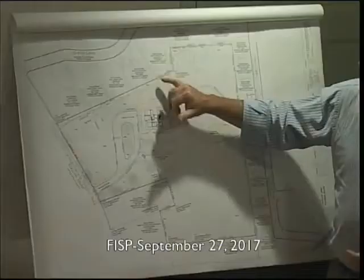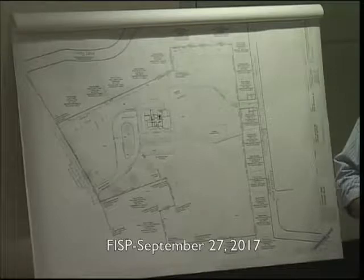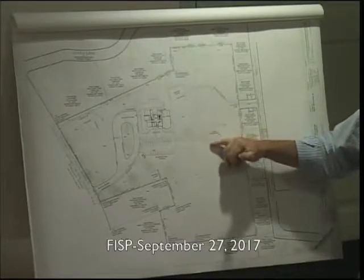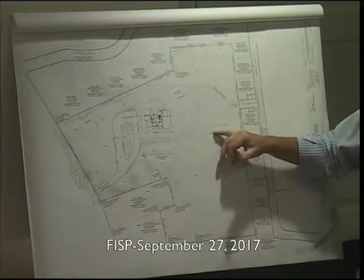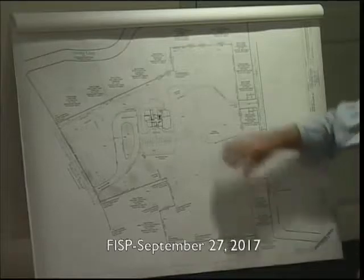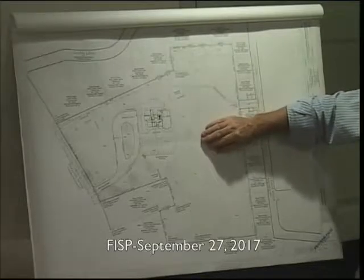Well, you can't go too much further back in, because there's some wetlands. Well, there's no designated wetlands right on the back now. Actually, in talking to Bill, he has reviewed this area, and he will be making a pitch to the Conservation Commission that this is not a designated wetlands or PDH or PDW. So if he's successful, and he has reasons to believe he will be, this might be damp, but it's not qualified as a wetland.